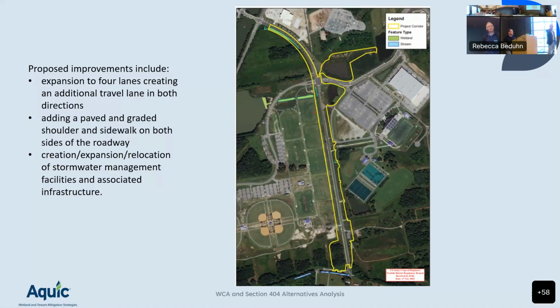Stormwater ponds are easiest to build at the lowest point in the landscape, right? What's always in the lowest point of the landscape? The wetland. But there's been a lot of success and a lot of innovation and ingenuity in ways to manage stormwater that don't require a big pond on the ground. I mean, there's all kinds of different techniques nowadays. So again, small impacts, not as much scrutiny. Big pond in a nice big quality wetland, we're probably going to look at some other alternatives to treating that. So those are the things that come to mind for this project for me.